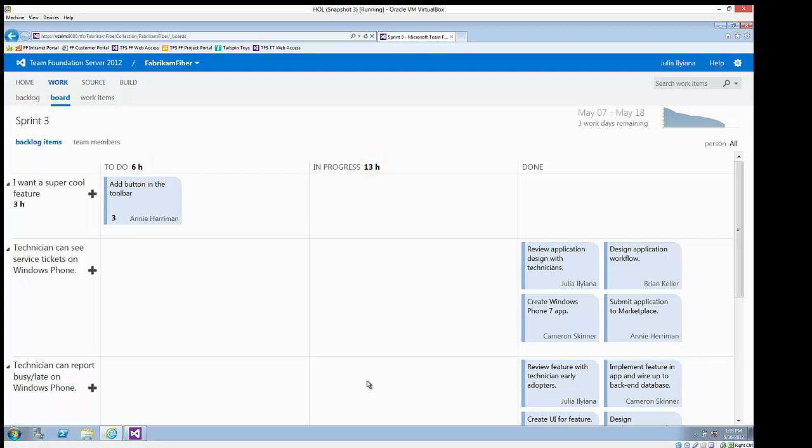But is there a baseline? Like in the concept of, say, Microsoft Project, a baseline for each one of these tasks, so that as the estimates change or the amount of time the task drags on, you have a reference back to the original estimate? Well, there's an extension for MS Project, and that will add another tab on the work item. It's for the project management. So I would say yes, but as long as the project manager doesn't change that time, then I guess it's okay. The other thing is for each work item, there's a history as well.